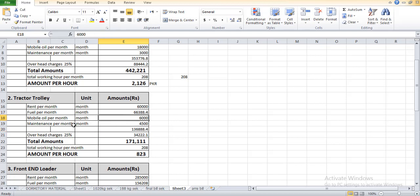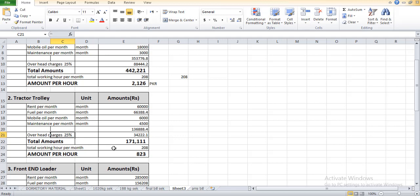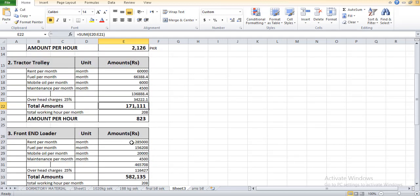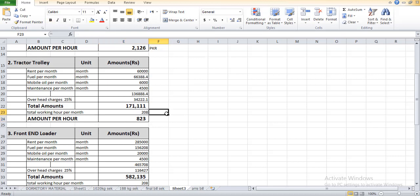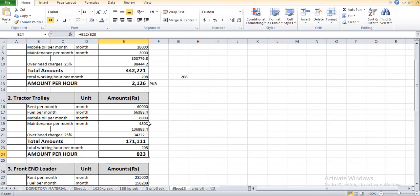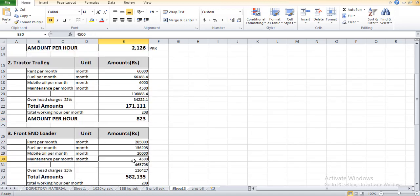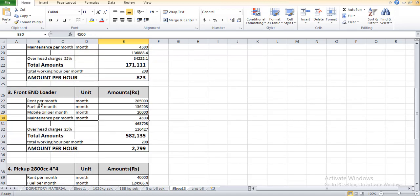Mobile oil we consider 6,000 which the main contractor will provide, maintenance cost is 4,500. The total cost per trolley is 136,388 rupees. The overhead charges is 34,000. The total amount, similarly, is 26 days times 8 equals 208 hours. The total cost per hour is 823 rupees.